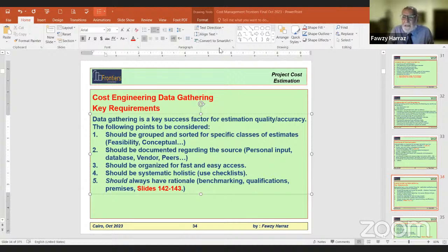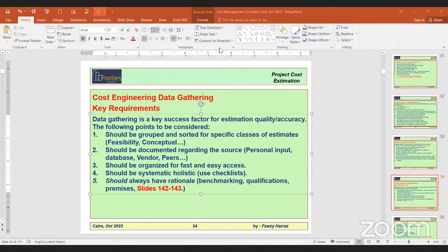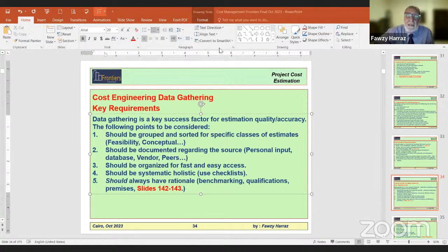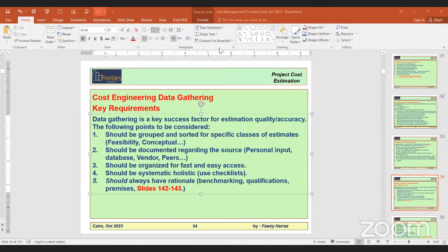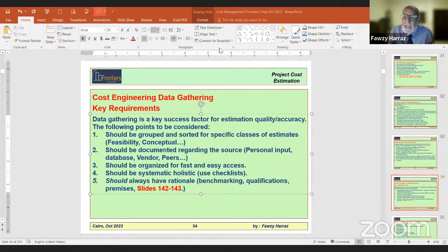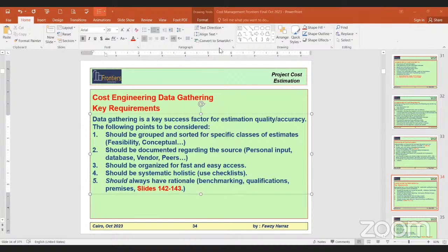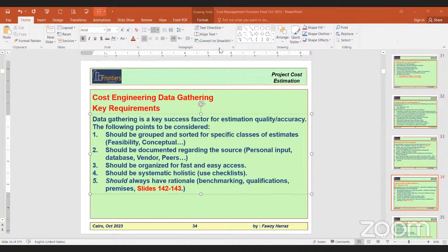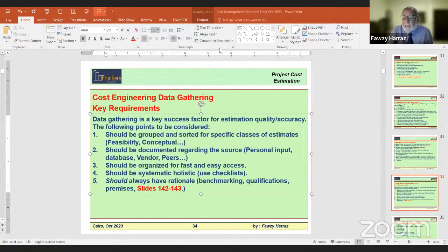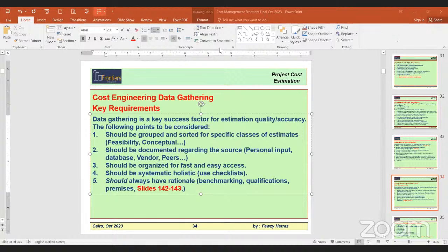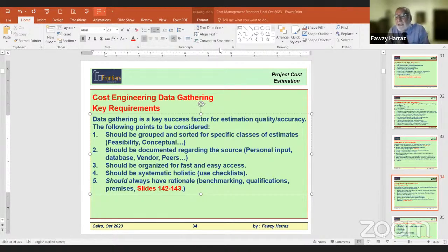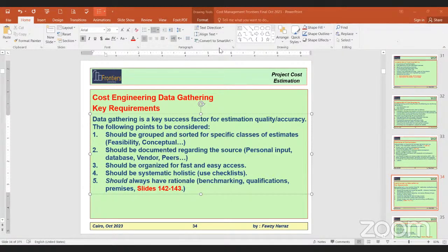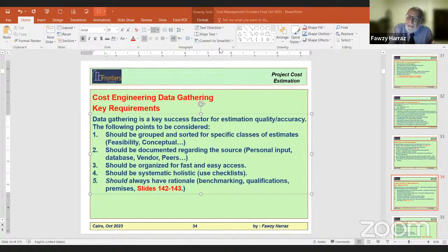Anyone in the company is free to approach an equipment supplier, a material supplier, or any contractor for unit rates and costs based on preliminary information, and they will give you budget quotations, which are normally accuracy plus or minus 15%. This is the best you can get. But the estimator should have full access. In this case, it is the cost estimation that decides if the bid figures are healthy, reasonable, or market-based.